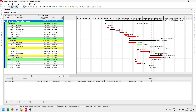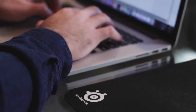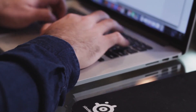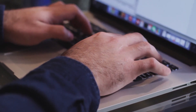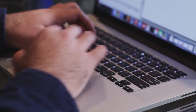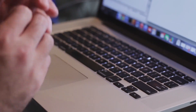I already have the schedule of the project in Primavera P6 and I also have the project cost from the bill of quantities. Now there's only one step I need to do to generate the S-curve of the project, and that's by performing the cost loading of the project.